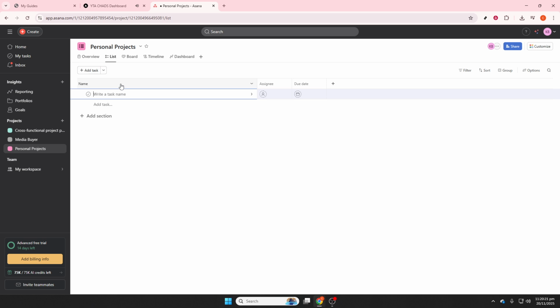Use subtasks to break larger efforts down. For example, a task like Launch Marketing Campaign might include writing copy, designing graphics, preparing the ad budget, publishing ads, and reviewing performance. This keeps your main board uncluttered while preserving detail.